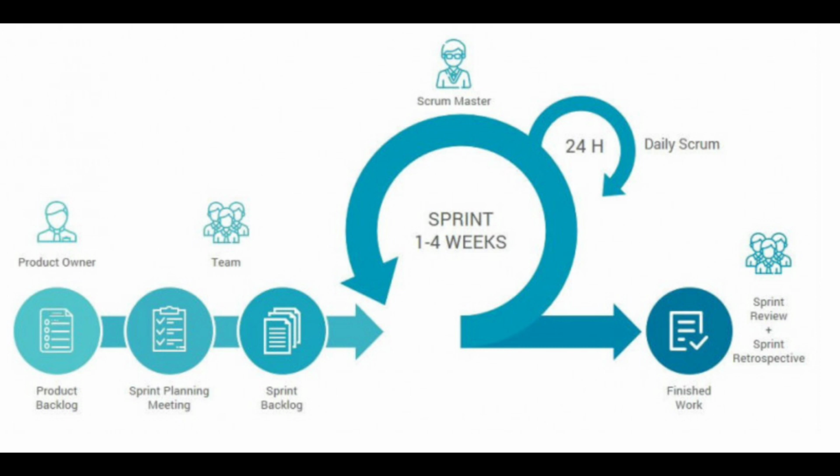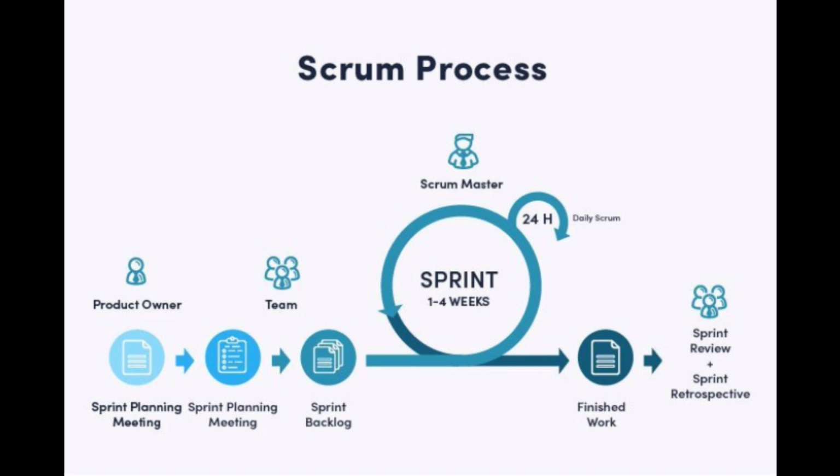Next Agile ceremony is the sprint review meeting. Once we are done with the actual work, we will have a review or sprint demo meeting. We show what test results we captured and what user stories we covered, and the business analyst and product owner take a look. Next Agile ceremony is the sprint retrospective. Here we capture what went well in this sprint, what did not go so well, and what action items will drive future sprints in a safe manner. These are the things we capture somewhere in SharePoint or a Confluence page.